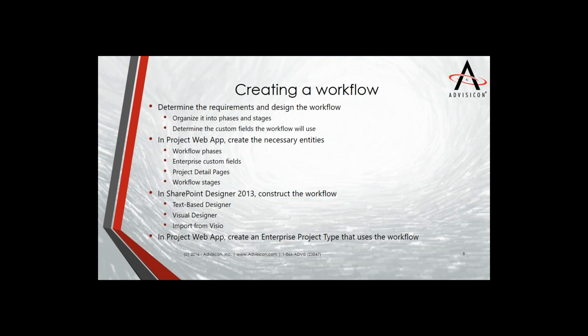After we've done that construction of the workflow, we'll publish it into our Project Web App environment, our Project Online environment, and then we'll go into Project Web App and we'll create an enterprise project type that pulls that together with project sites, project schedule templates, and PDPs, the project detail pages. And then we'll create a project using that.